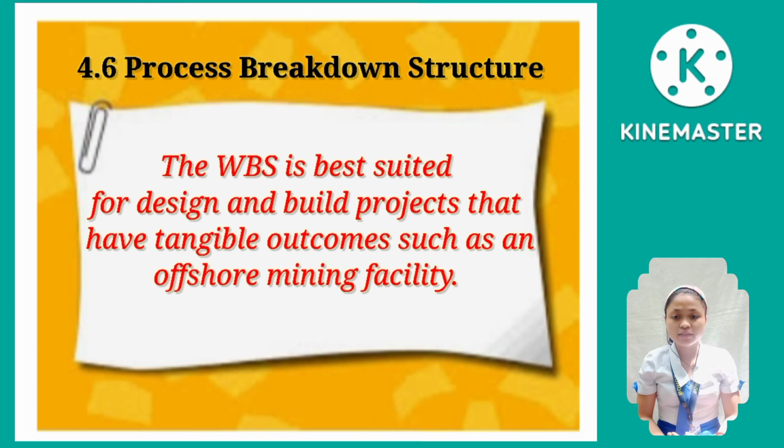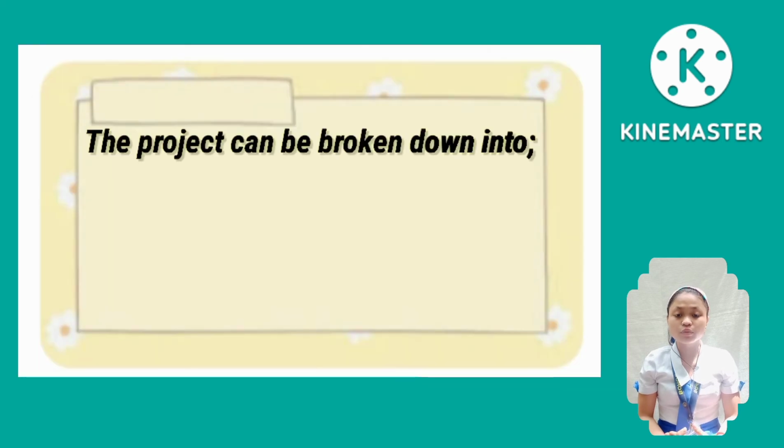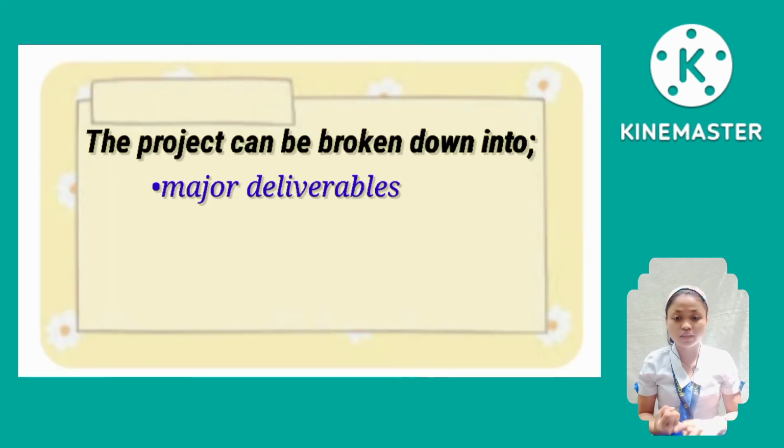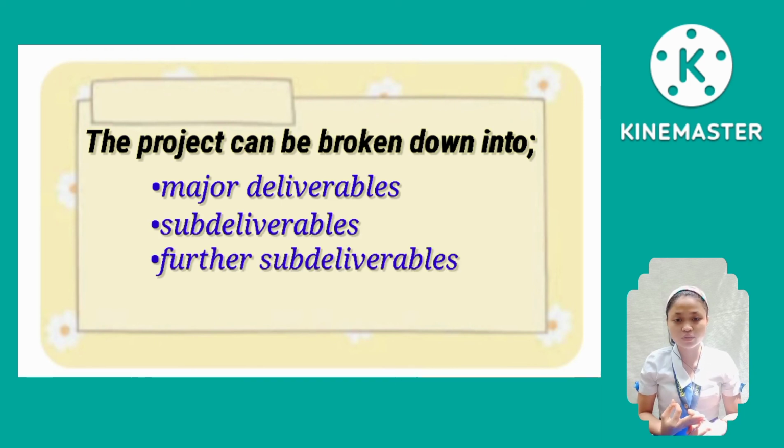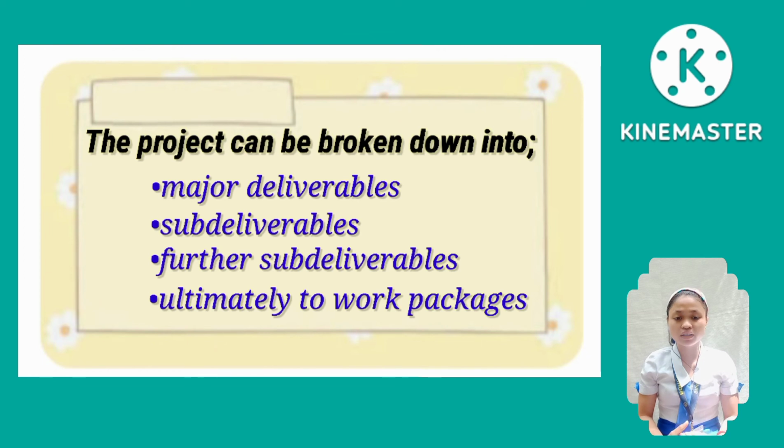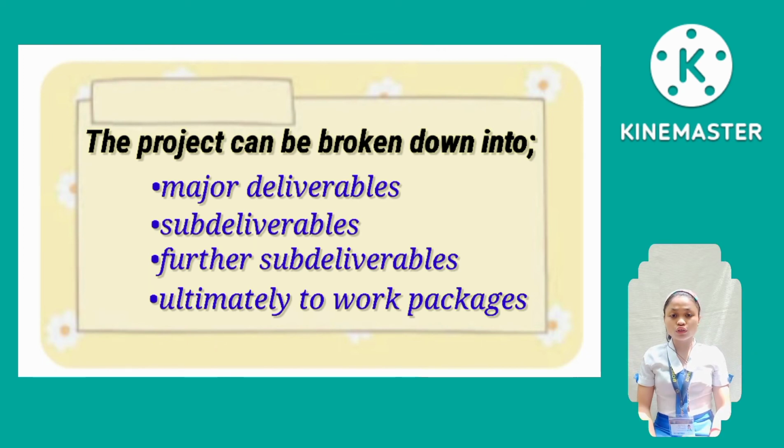Let's tackle the process breakdown structure. The WBS is best suited for design and build projects that have tangible outcomes, such as an offshore mining facility or a new car prototype. The project can be broken down into major deliverables, sub-deliverables, further sub-deliverables, and ultimately work packages. It is difficult to apply WBS to less tangible, process-oriented projects in which the final outcome is a product of a series of steps or phases.